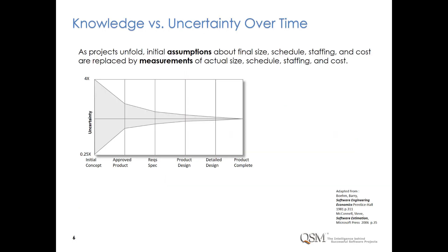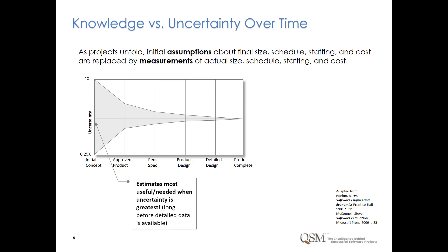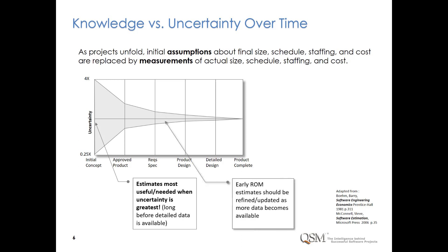Estimation is challenging because estimates are needed early in the project lifecycle when very little data or knowledge is available. Because so much about the project is unknown, the level of uncertainty and risk is high. Uncertainty about the final size, effort, schedule, cost, defects, and productivity decline as the project progresses, but never completely disappear.